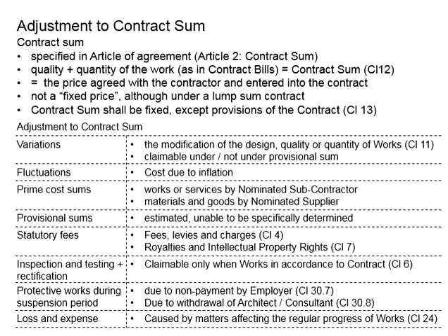That means the contractor should have already anticipated a price under this statutory fee during the formation of the contract. By right, this statutory fee should be claimable. Either it is already incorporated before the formation of the contract, or if any new regulations are applied, those fees should be adjustable to the contract sum.